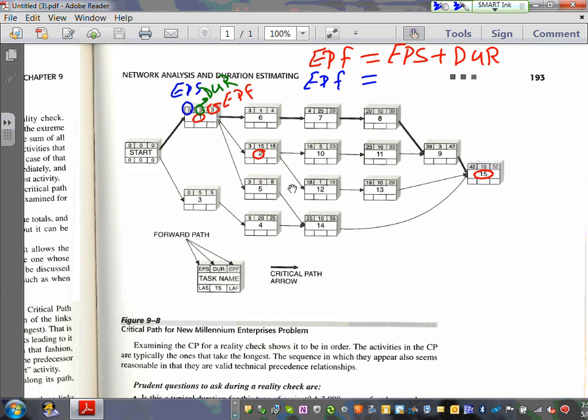possible finish time for this activity right here, it equals 0 plus 3, which is equal to 3. So 3 weeks. Each one of these is a week. Any comments, any questions? One more time. I know we're getting into the itty-bitty with it, guys. Each activity, Adam, is assigned the earliest possible start time and the duration. When can you start it in the project? Week 1, week 2, week 3, when? So this activity, guys, will start at week 0, and it will be assigned the duration of 3 weeks. Am I making sense? Easy.